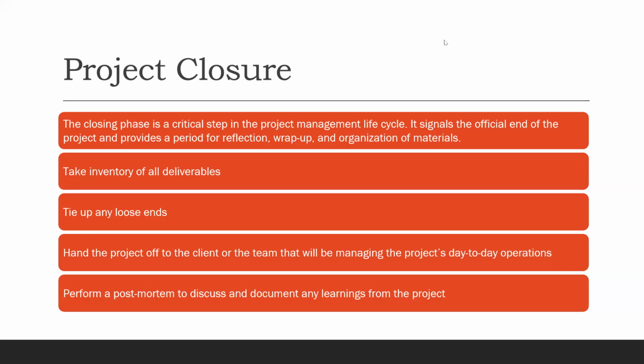The exit strategy workshop is the best platform to do that, because the closure is a phase. Within this phase, you now begin to do your end line. Remember, we said baseline is done in the beginning, and then you keep those results, you work it, then you now do an end line. That is part of your closure phase. And you do your end line, and you compare the results of the baseline with the results of the end line. When we started with the project, this was the situation. And when we ended the project, this is the situation. And you tie up any loose ends.